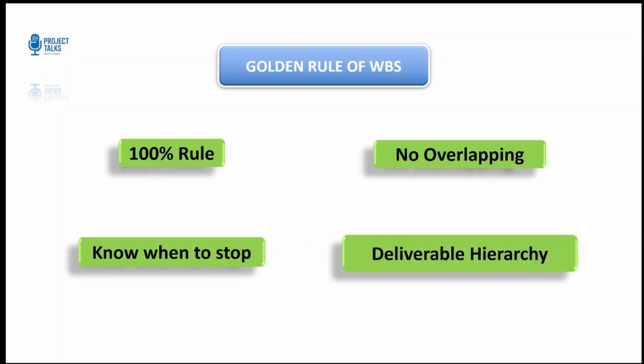Now, finally, remember this one: the WBS is not a task list. It defines what needs to be delivered, not how you will do it. These rules keep your WBS clean, complete, and aligned with your project scope.